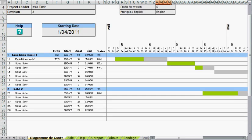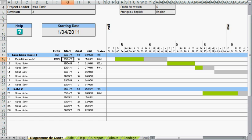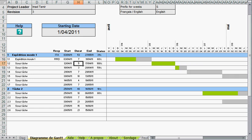To input an item in this Gantt chart you just input the title of the task, the responsible member, the start date and then the duration. The Gantt chart will automatically adjust.